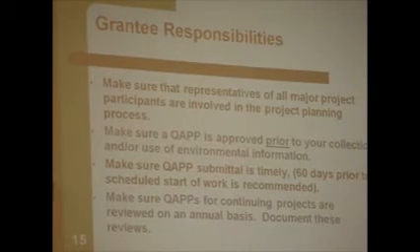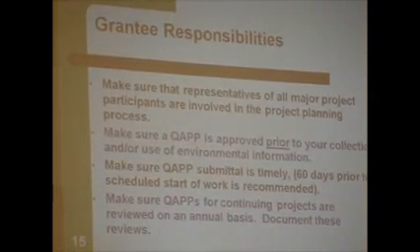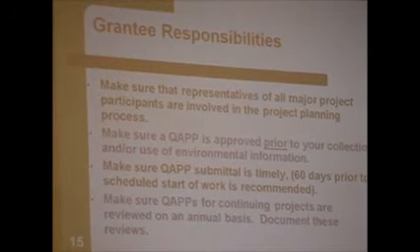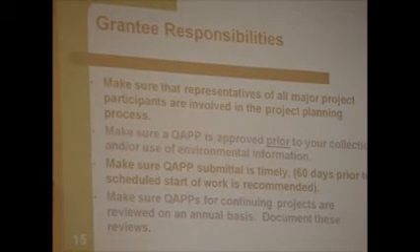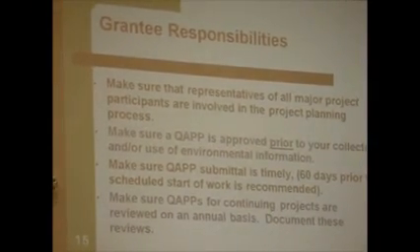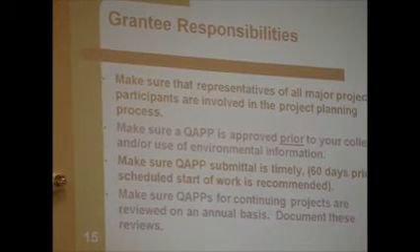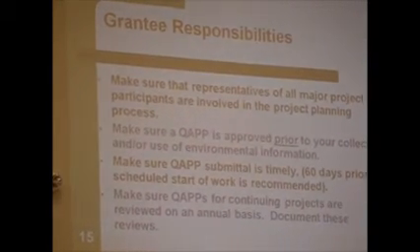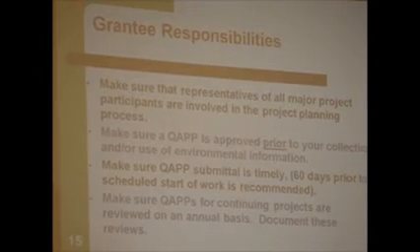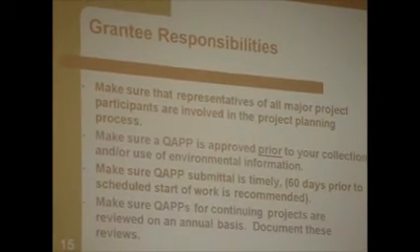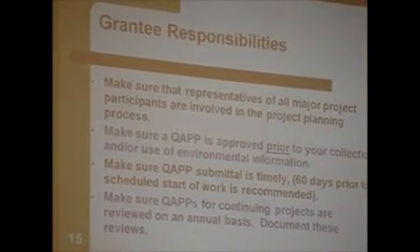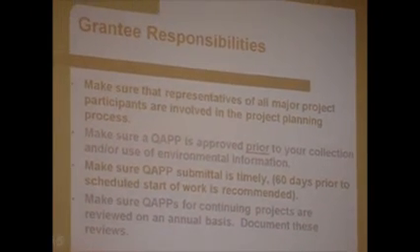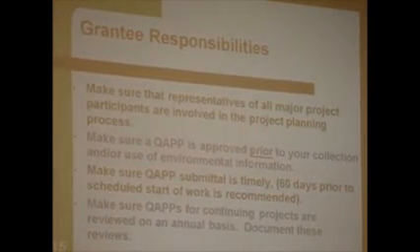You can get yourself in some trouble with our grants folks if you start doing work without having an EPA-approved QAPP, then you may not be reimbursed, so be careful. Make sure your QAPP is submitted timely. We have a lot of projects to review, so we're requesting 60 days. And for those of you who have long-term projects, make sure every year you review them and keep them up to date, because things do change.